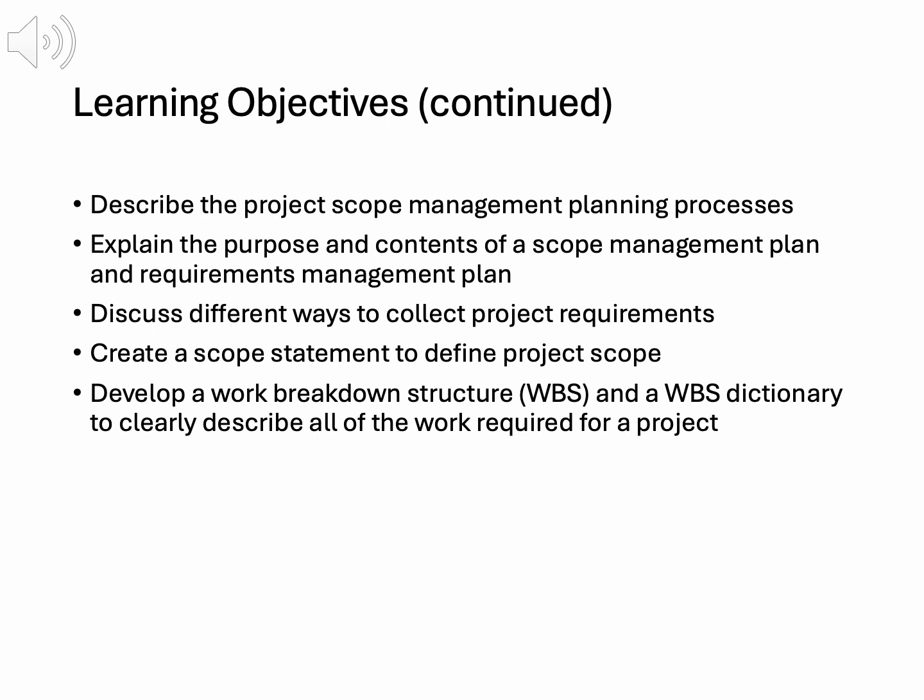Another objective is creating a scope statement to define project scope. This document outlines deliverables, acceptance criteria, and exclusions, setting clear boundaries. We'll explore how a well-crafted scope statement prevents misunderstandings and keeps projects focused.